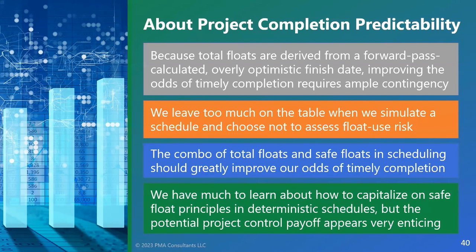Next question comes from Besher. Limited Safe Float activities seem to be similar to what we used to call in the Middle East near critical activities, and we define them as activities with total float of less than 2 weeks. Are these two concepts the same? Not really. And Dr. Vivek can chime in too, but Safe Float is based on duration uncertainty. It's based on risk. Near critical activity is still based on one scenario. Safe Float is based on every possible scenario on your schedule.